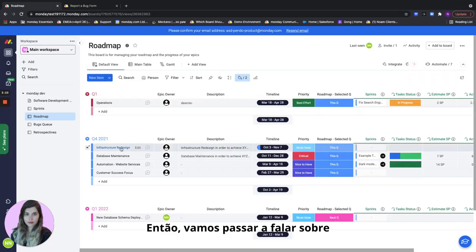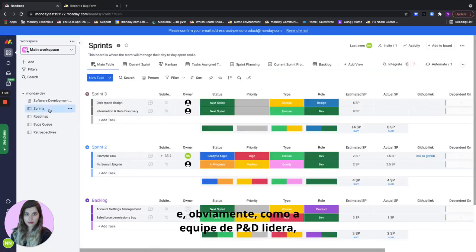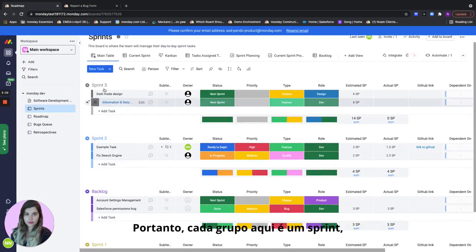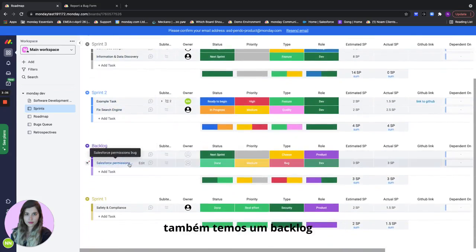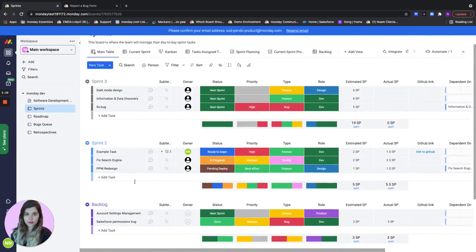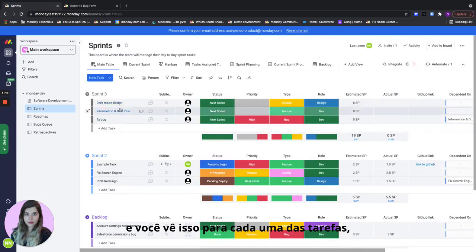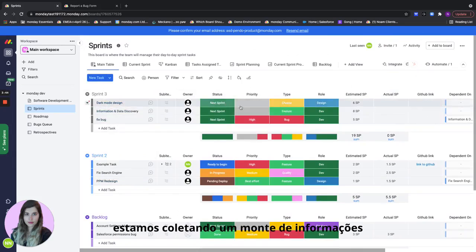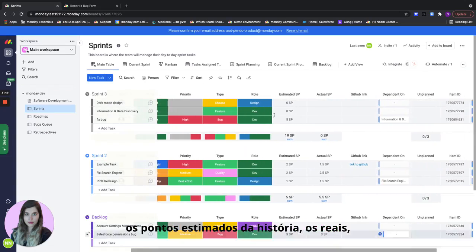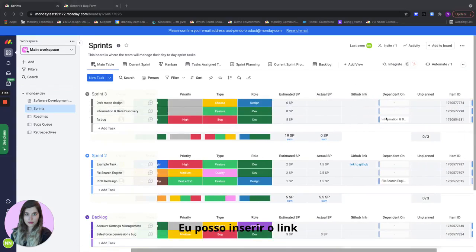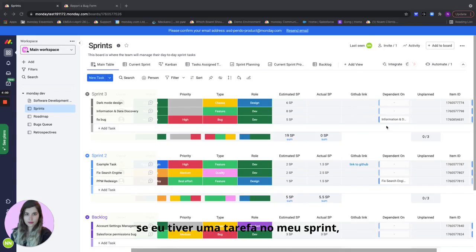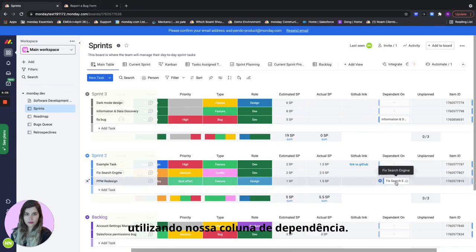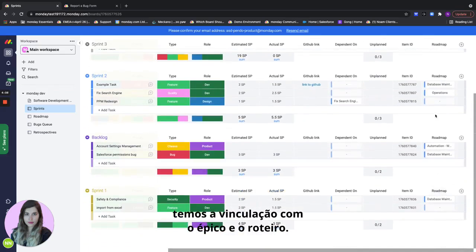Let's move on to talk about how we manage our sprints. Let's go to our sprint board and obviously as R&D team leads this is extremely important to us. Each group here is a sprint. We also have a backlog just as we have on the product roadmap. The top sprint will always be my current sprint and for each of the tasks we're collecting a bunch of information regarding priority, type, role, the estimated story points, the actual ones, an integration with GitHub. I can insert the link to the pull request right here. I can also add dependencies so if I have one task in my sprint that's dependent on another task I can just connect them right here using our dependency column, and at the end we have the link to the epic and the roadmap.